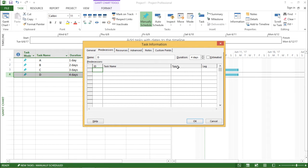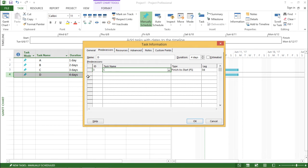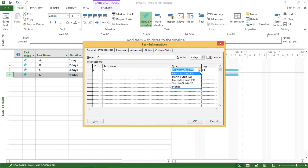We are going to focus on the different types of predecessors. Under the task name, I have to select a particular task. I'll go to the task drop-down box and select C. So I am creating a predecessor for task D — C will be the predecessor for task D. When I select C, on the right-hand side I have the type and the lag. If I go to the type column and click on the drop-down box, I can see there are five different types: finish to start, start to start, finish to finish, start to finish, and none.